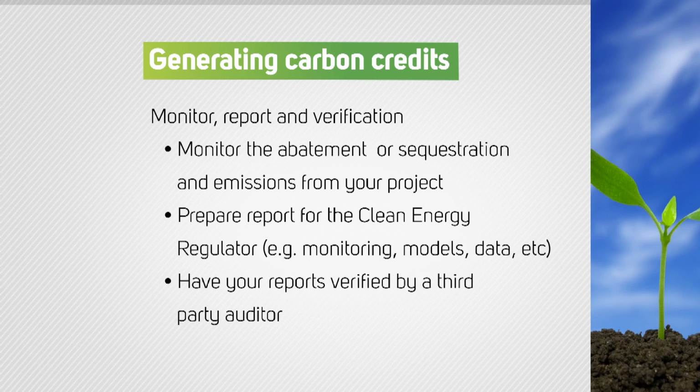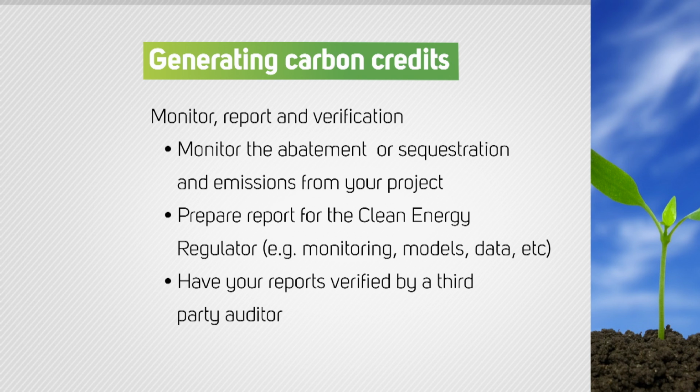And you go through this process, and then annually, once a year at least, or anything out to 5 years, you have to prepare a report for the CFI administrator and submit that report. But importantly, before you get your credits issued, you have to have it verified by an independent third party. And that independent third party is someone who has been approved by the government to actually undertake the activity. So that is someone who's on the National Greenhouse and Energy Reporting System panel of approved auditors.